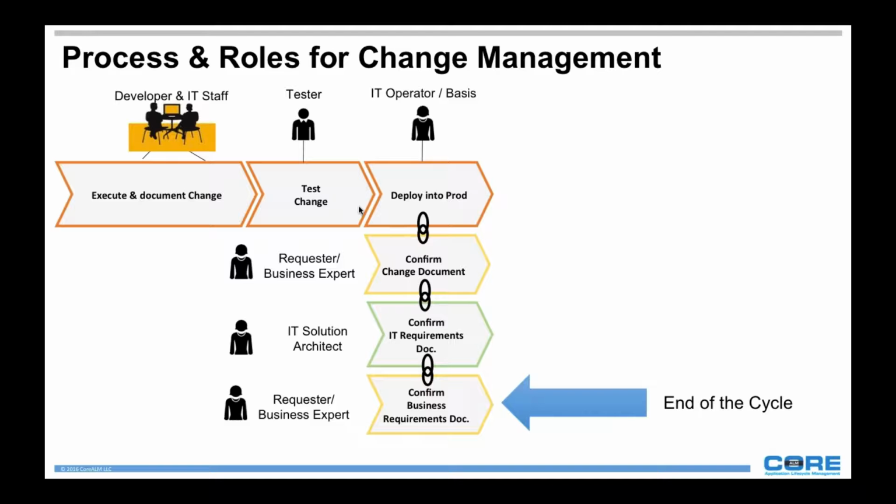Requirements talk to IT, IT defines the scope and assigns it to a release, then the change gets developed, the change gets tested, we control that through the cycle, and then eventually from the cycle we move to deploy, and that means we're ready to deploy.